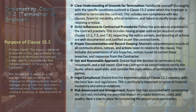To effectively implement Clause 15.2 from the FIDIC Yellow Book, several essential factors need to be considered. This approach ensures that the termination process is compliant with contract terms and handled professionally and ethically. Gain an in-depth understanding of the specific conditions that authorize the employer to terminate, including non-compliance with key clauses, financial instability, ethical violations, and failure to rectify issues after a notice. Follow the contractual procedures meticulously, involving issuing the required notices as per Clauses 15.1, 7.5, and 7.6, adhering to notice periods, and ensuring all actions are appropriately documented.